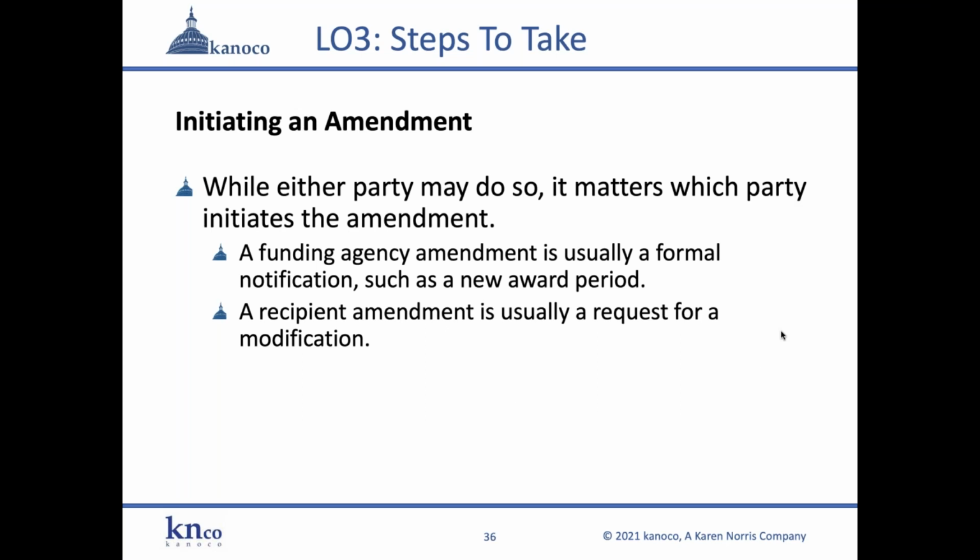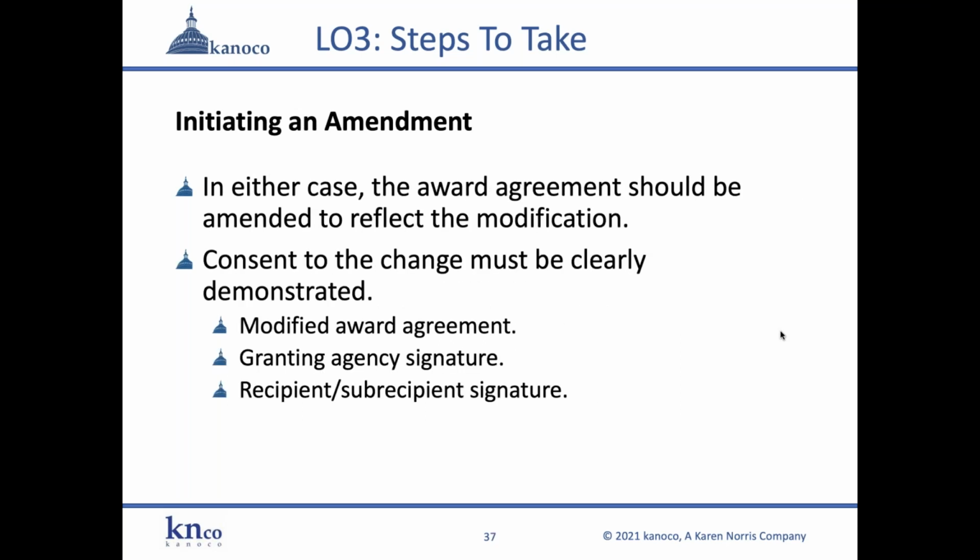If the funding agency initiates, it's always a formal notification that's sent to the recipient that is modifying the award document. And then the recipient, if the recipient initiates an amendment, that's usually a request for a change or a modification. In either case, the award agreement should be amended to reflect the modification, and consent to the change must be